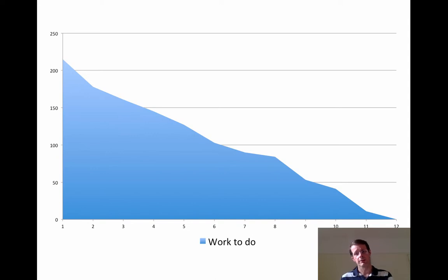This is perhaps the most popular type of graph you find in an Agile team. Some of you have seen it before. It's called a burndown chart. It shows the amount of work a team has to do and their progress towards getting it all done. There's a few points I'd argue with burndown charts. But on the whole they are good. And you're far better off with a burndown chart than without a burndown chart. They help you get an understanding of what you're up against. They help you see your progress over days, weeks, iterations, ultimately months. Graph out the work you've got to do and how fast you're doing it. It's that simple.